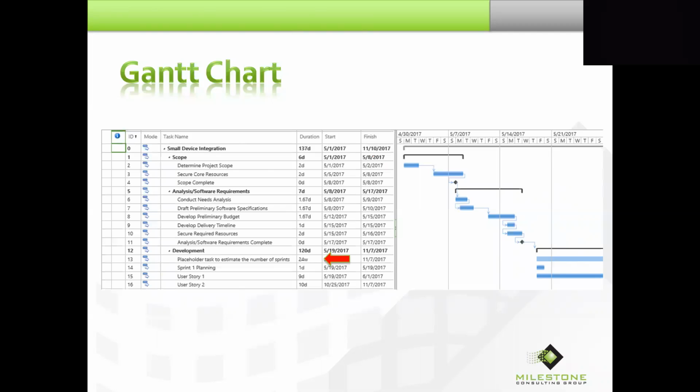You'll notice that I'm doing something that I would never do in a critical path project, and that is linking the summary task. But I figure it's okay because everything in that Agile development has to get done before the project is done. We might have many releases in that Agile development, lots of go-lives, but the project can't be completed until all of it's done.